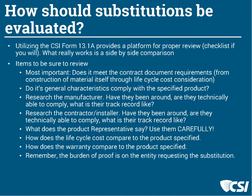Our practice is to send them right back: if you aren't willing to take the time to do a side-by-side comparison, request denied. In North Carolina, on design-bid-build projects, substitution requests must be submitted before the bid — typically by a date set one week before the bid. If I accept it, I have to notify all other bidders that it is a new acceptable alternative to what I specified. So the state helps us process those requests. Dean also noted it's helpful to use the four Cs — clear, concise, direct, and complete — for substitutions, a CSI recommendation.